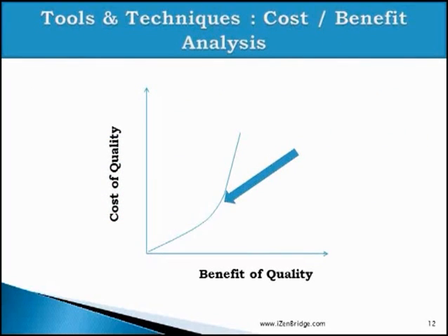Now, how much money should we spend for ensuring the quality? So we should do a cost benefit analysis. Like if you are from a software project, as many times as you test the product, you may find 2-3 bugs. So how long should you keep testing? You need to identify some level at which you will say that this is my cost benefit point, and I will invest this much amount of money for the quality. Now, how to identify that particular point?